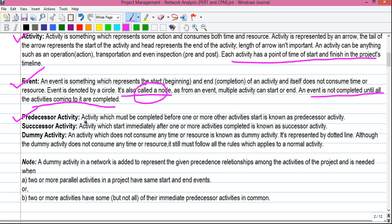Now, coming to types of activities — there are three types. The first is predecessor activity: an activity which must be completed before one or more other activities start. For example, your travel is the predecessor activity of starting the survey. Next is successor activity: an activity which starts immediately after one or more activities are completed. Starting the survey is the successor activity of the three travel activities.